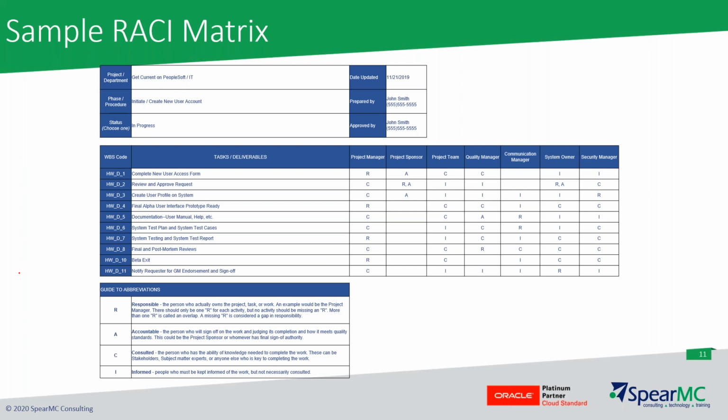So, who am I talking to on a daily or at least a weekly basis? That's the person responsible, right? So I'm making sure I'm marking them. And if I'm not getting the response I need, I look to talk to the accountable person, the person with an A in there for that activity, and so on.